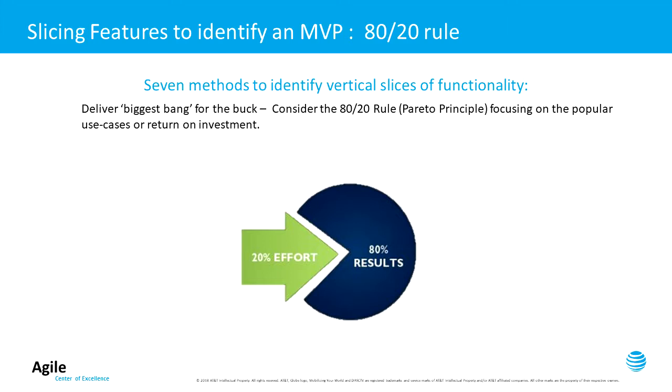Scrutinize items that are on your to-do list or in your backlog with effective prioritization, as chances are just a few of the items are truly tied to the important issues. The 80-20 rule suggests we should focus on the few items that will generate the most significant results. Remember that 80% of the benefit will likely come from only 20% of that backlog list.